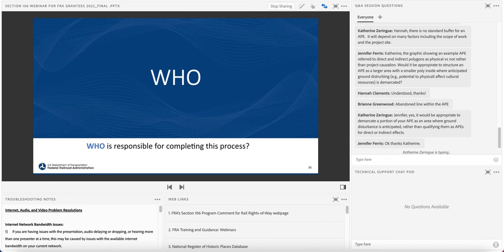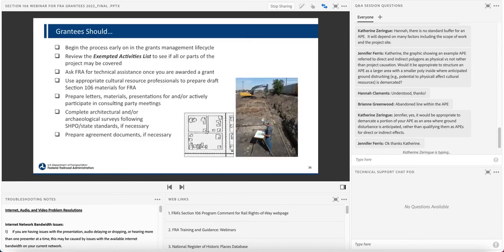Next, we're now in our last portion of the webinar, where I will explain who is responsible for completion of different parts of the Section 106 review process with FRA. Grantees should assist FRA in the Section 106 process, but not complete it on FRA's behalf or independent of FRA. While FRA has historic preservation professionals on staff to help complete the Section 106 review, FRA does not do the Section 106 legwork. Rather, we provide technical direction to grantees and their consultants to manage the Section 106 process.